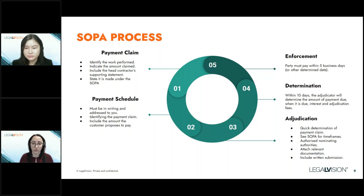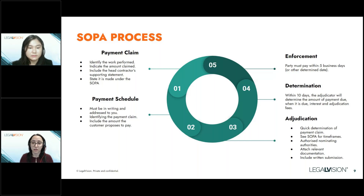Once all documents have been provided to the adjudicator, the next step is for the adjudicator to review everything and provide their determination. Generally the adjudicator provides a determination within 10 business days from the date on which they notify the parties that they accepted the adjudication application — there are limited situations in which this can be extended. The adjudicator can determine the amount of the progress payment the respondent must pay, the date on which that amount became payable, any rate of interest payable, and the proportion of the adjudicator's fees payable by each party. This process is entirely in writing, usually provided as a summary document with orders and reasons.